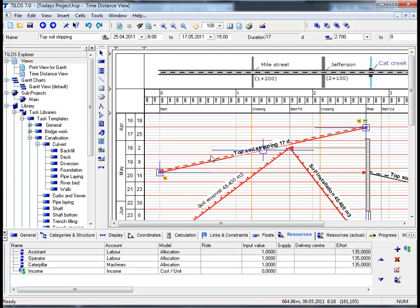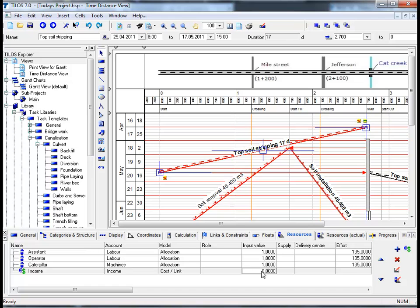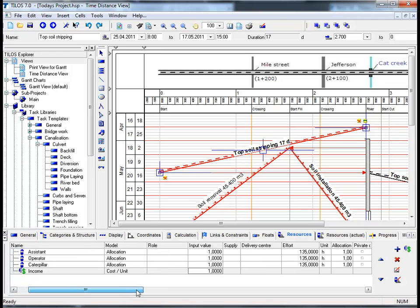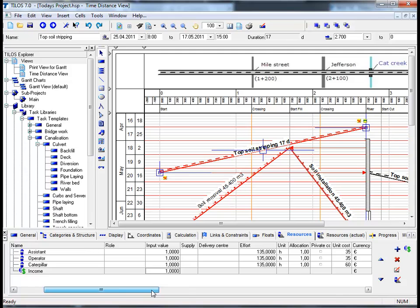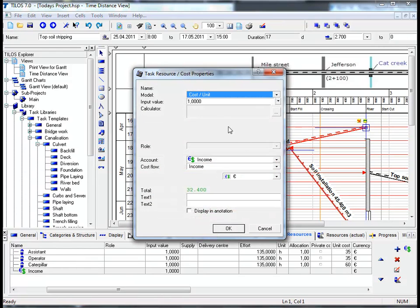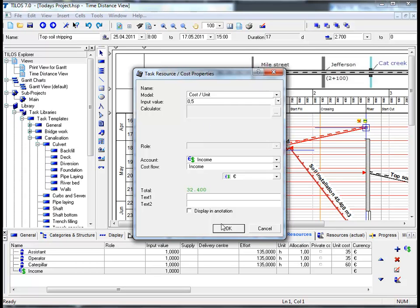It is worth mentioning here that direct costs can be assigned as a fixed value, for example 10,000 euros for the entire task, or based on time—500 euros per day—or based on the task quantity. However, in this specific example, we are going to change the input value to 1 and drag the scroll bar along slightly until we reach the unit cost column. If we insert, for example by double-clicking this field, the input value 0.5 and confirm by clicking OK.